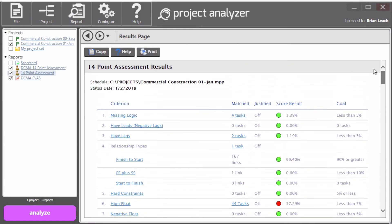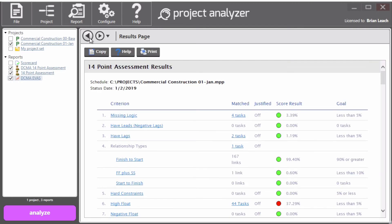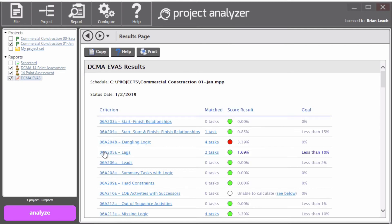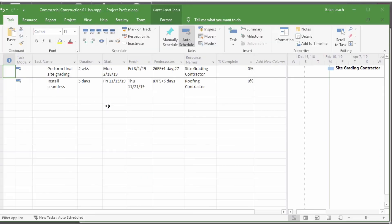And then the EVAS report also looks similar, except this time, instead of, let me hit back, this time, it will show you the checks that come from the specification. So same thing though, if I were to click lags, for instance, it explains what this check is for and gives you a score. And the link down here will also take you into Microsoft Project and show you those activities that have relationships with lags.